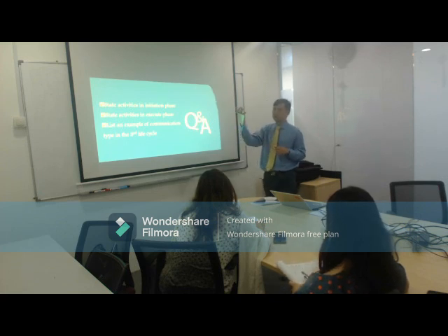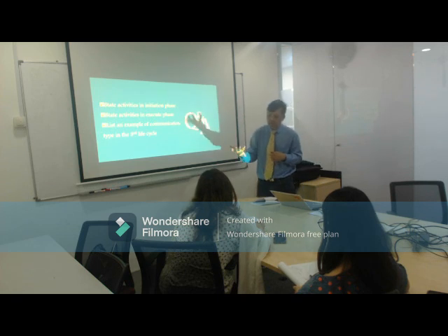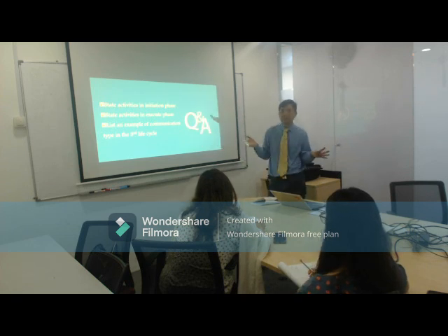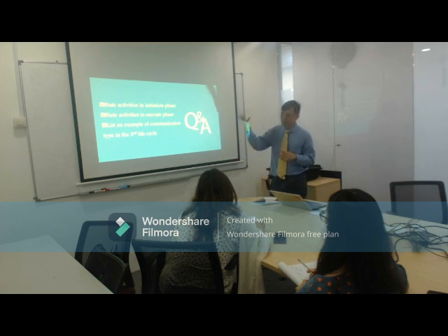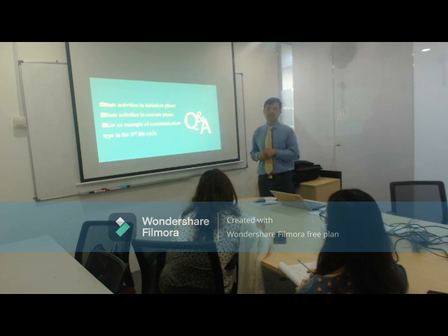Steering committee will be the one controlling: do we keep the project going or do we cancel the project? Or do we add in money for the project? Or do we provide more time? Or we change the quality of the project? Right, so that's what we call a steering committee.